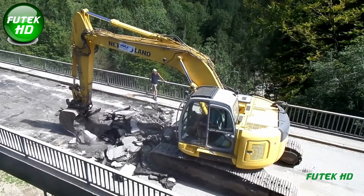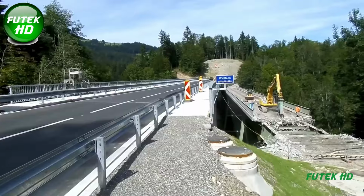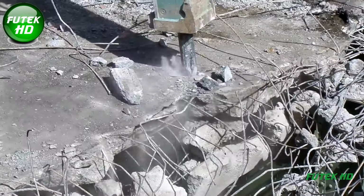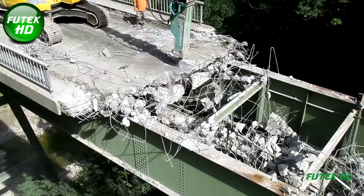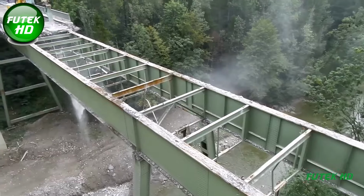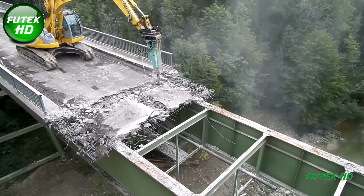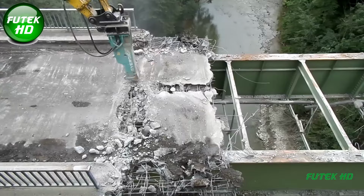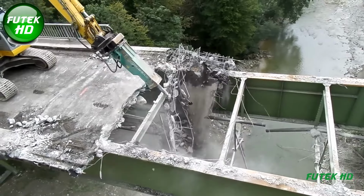After the new bridge was operational, the old structure was carefully dismantled. The removal process began with the deck's asphalt layer, followed by the steel-reinforced concrete deck. Special attention was required to maintain stability during this phase. Steel components of the old bridge were divided into sections, lifted out with cranes, and transported off-site. The remaining columns were anchored with steel cables before being dismantled and removed.